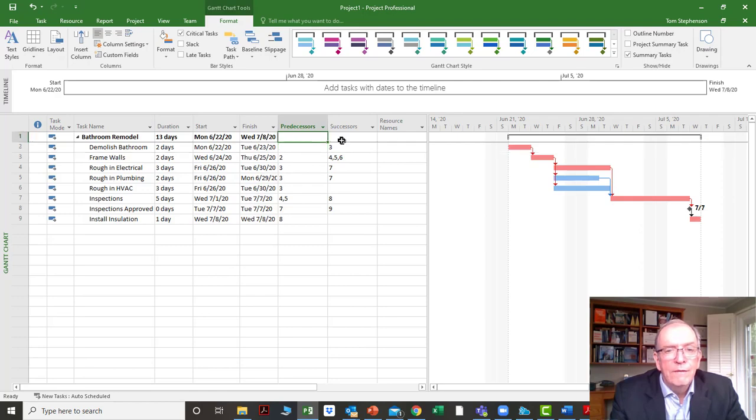If I've done the headings, like the summary tasks, really well, then I shouldn't have anything linked to the summary tasks. We'll talk about that in another tutorial as well. It's best not to link to summary tasks. The program lets you, but it's best practice not to. And I'll stick to what's a best practice in my discussions on tutorials. And I'll tell you also where there's some things that are a little bit more flexible. So I'll tell you good best practices, etc.